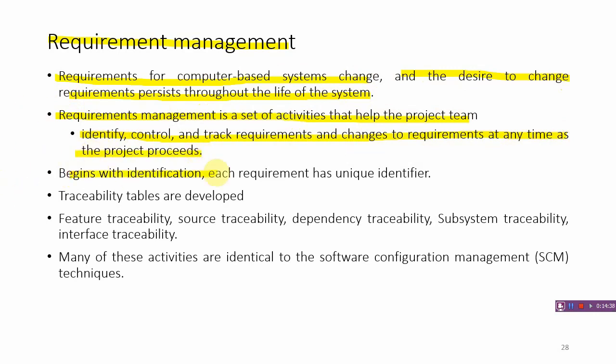It begins with the identification. Each requirement has a unique identifier. Traceability tables are developed. Feature traceability, source traceability, dependency traceability, subsystem traceability, and interface traceability are being used. Many of these activities are identical to the software configuration management techniques.